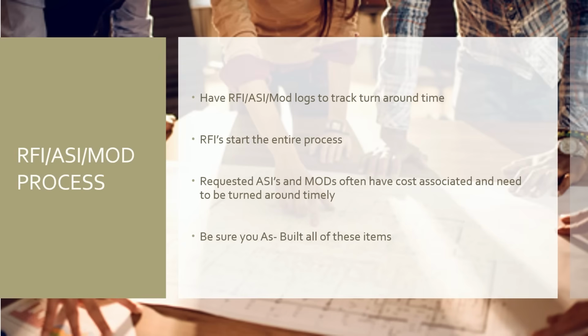We've worked with designers that could RFI things until the cows come home. They have no problem doing that, but they don't want to do any ASIs, because the ASIs take their design, and it takes their time and their money, more of it. So it's really important that as a QC manager, you understand your contractual requirements. When it comes to ASIs and mods, you're going to have soft-spoken clients where you could change the whole world with just an RFI, and they don't need to see ASIs or formal mods, and that's okay. You're going to get those clients, and that's awesome. Take it as a win, roll with those RFIs and go with it.